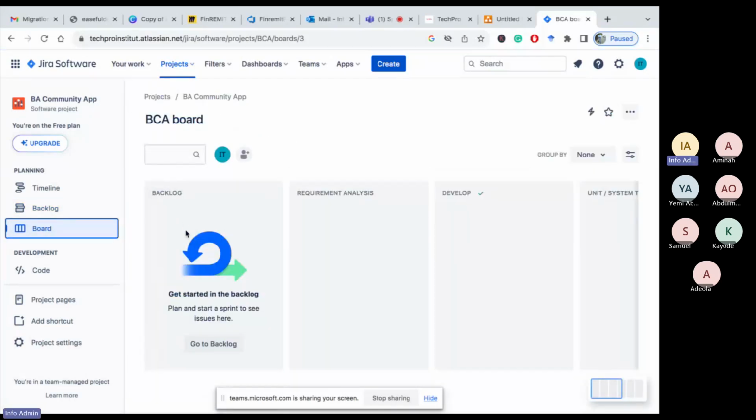Backlogs. You remember what we refer to as backlog then. Backlogs are lists. You look at backlog as a wish list. Everything that you need to create for that project will be under backlogs there. Now, let's say you have register, login, profile, comments, all those things. But for now, in your sprint 1, you've decided to go with register, login, forget password, and let's say write profile.